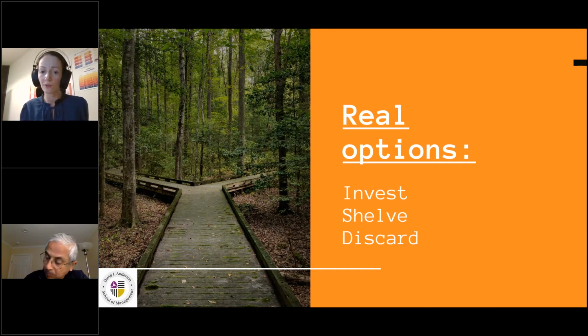Why don't we have the option to redeploy? Because from the Kanban perspective and Kanban design perspective, it's a combined option to discard and invest. So redeploying, when you think about your Kanban system design, would be first closing the request. So you close the request, you discard this request, and you reuse what you have learned. You create a new request, or you just add this information to an existing request. So in that sense, the option to redeploy in Kanban is the option to discard plus invest.